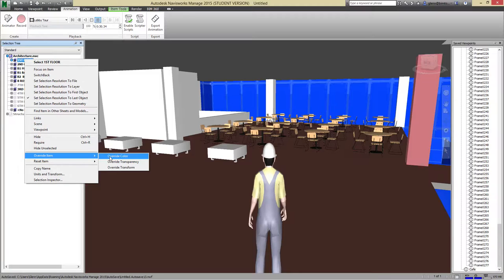But all these that we're appending are NWCs, right? Correct. If I go to the actual folder and change that NWC file, like change a column, would that update in the model? Like in Revit, you'll resave it as an NWC with the changes. And then that new NWC will reflect. So it's the same name, same locations, and everything. Yeah. It's just going to update.